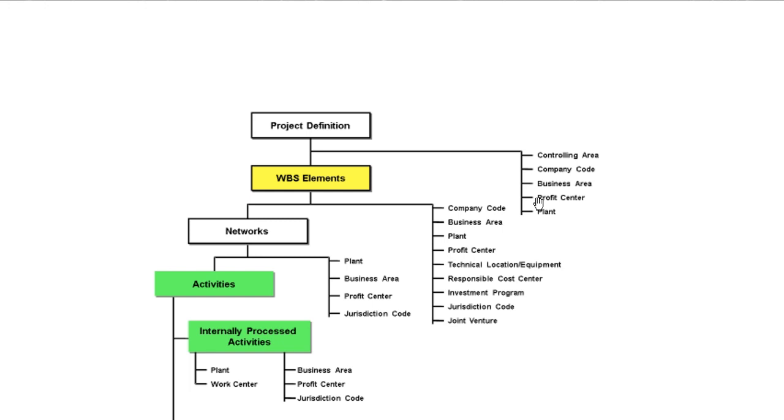It can have a single company code. I'm not saying that for each company code there should be only one project. For one company code there can be multiple projects. But one project you cannot assign to multiple company codes. That's how the assignment is.